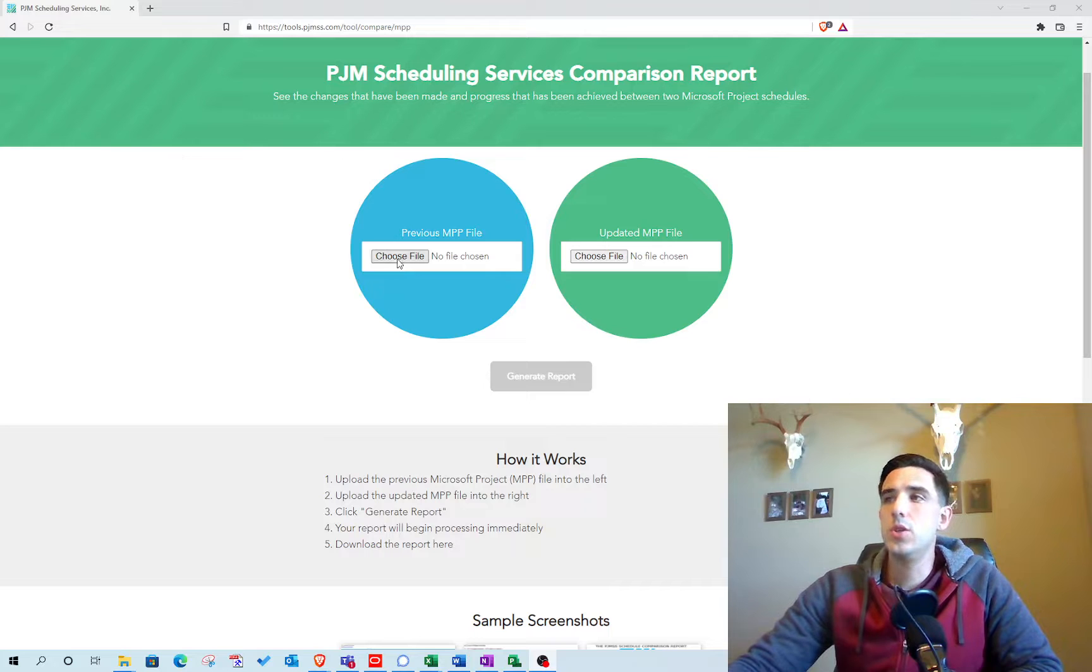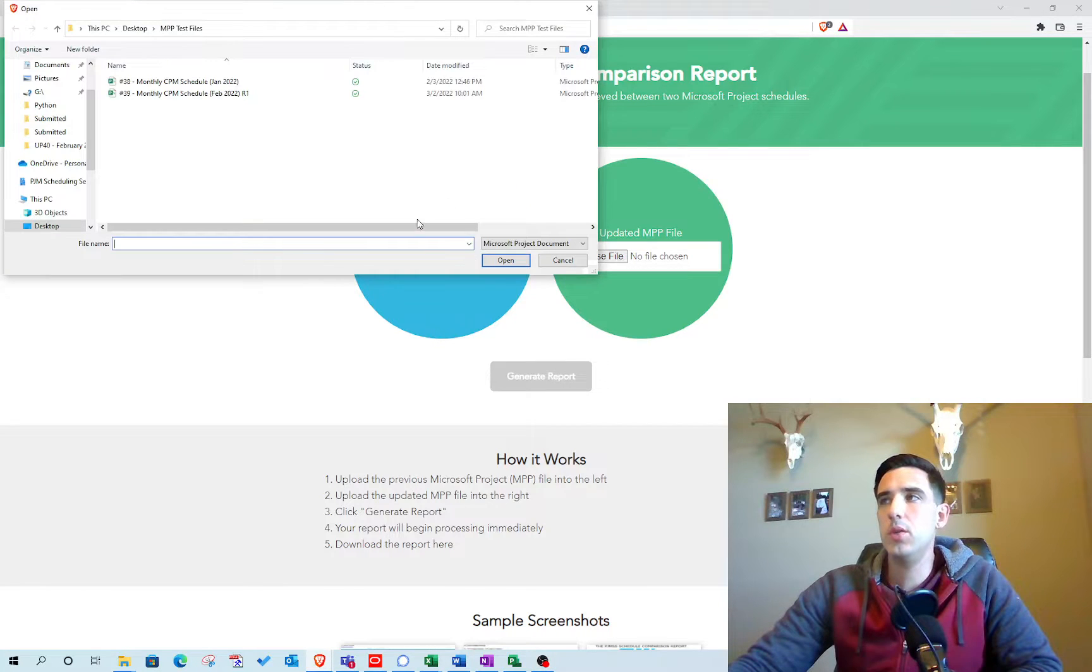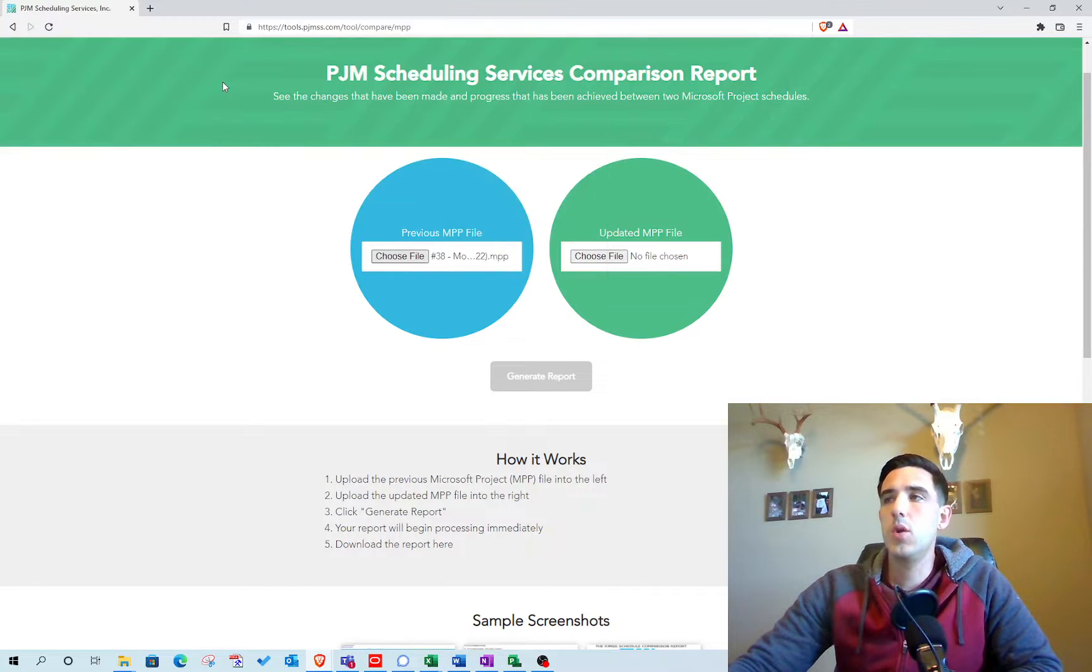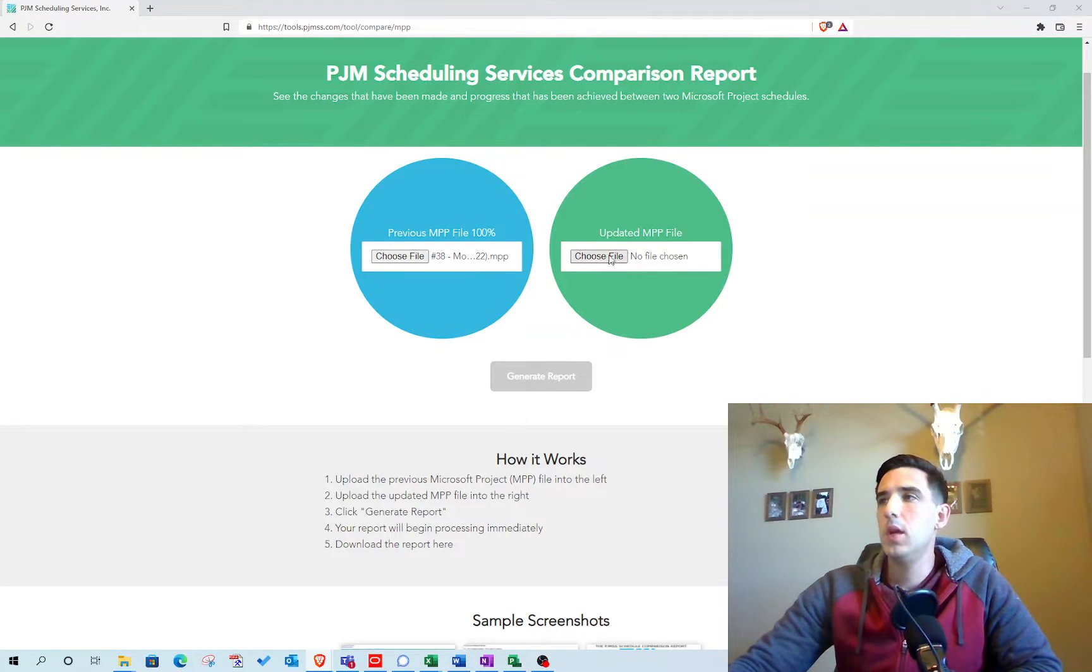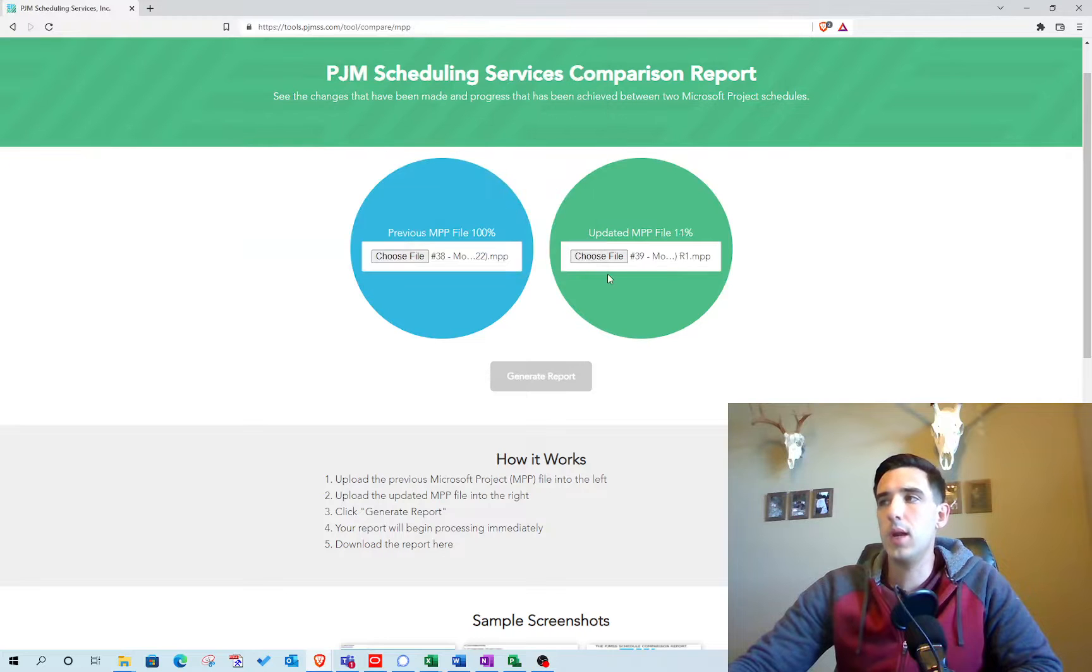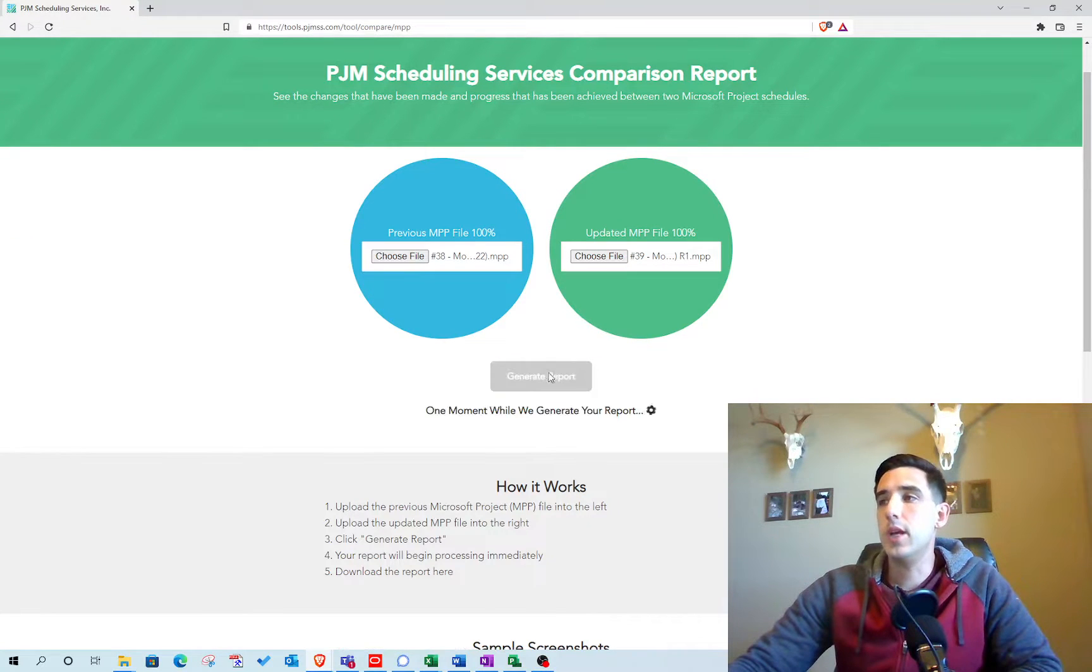It's super easy to use. All you do is select your previous MPP file that you want to compare back to, and then you choose your current file that you're wanting to compare to, and then you generate the report.